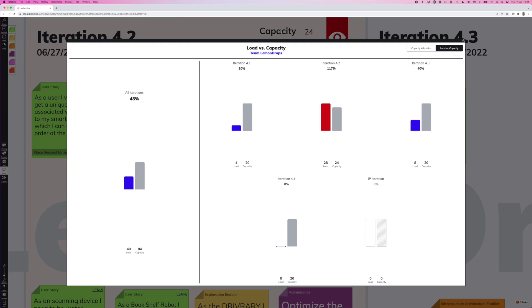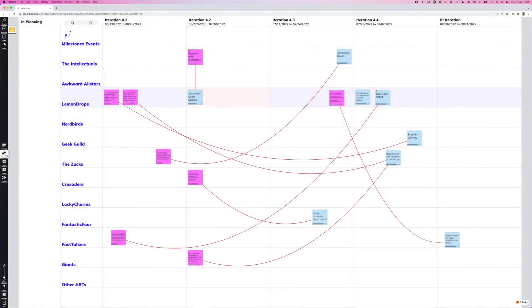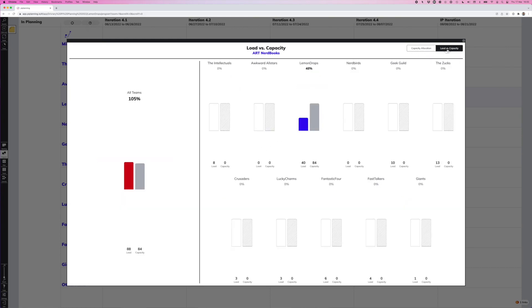For that, we go to the program board up here, we can click on the program metrics button and we can see over all teams, how the capacity allocation looks like for our art. And we can also switch to load versus capacity and see over all the teams, where are we at with our plan? So are we generally over planning or are we right within the boundaries?